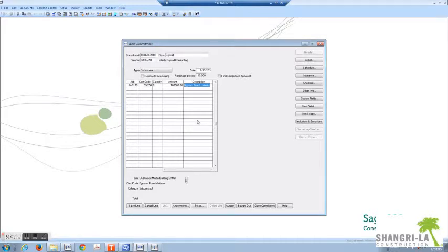Sometimes it's less, which would be a buyout savings, and that's a good variance. In this case, we're going over. Again, that's for a separate day as far as reporting. And so the description automatically comes up, and so we're basically done.